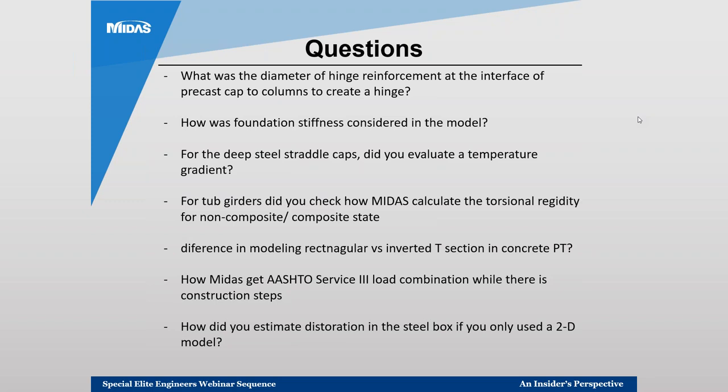Yes, when we designed the steel boxes, torsional rigidity was checked because of the loading conditions. Before, we were thinking of putting a condition on the construction that they install the pre-stress beams on each side of the straddle bent alternately so that we don't create torsional moments. But the contractor pushed back on that, as they didn't want to move their crane back and forth. So we analyzed it even with all the girders installed on one side first, which created these torsional moments, and we made sure that it's not critical. I think that question is about the U-shaped girder for the pedestrian bridge.